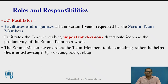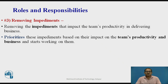Next is the Facilitator role. The Scrum Master facilitates and organizes all the Scrum events requested by the Scrum team members. He facilitates the team in making important decisions that increase the productivity of the Scrum team as a whole. The Scrum Master never orders team members to do something; rather, he helps them achieve it by coaching and guiding. He is also responsible for removing impediments that impact the team's productivity. Any impediments that team members cannot resolve on their own come to the Scrum Master for resolution, who prioritizes them based on their impact on team productivity and business.